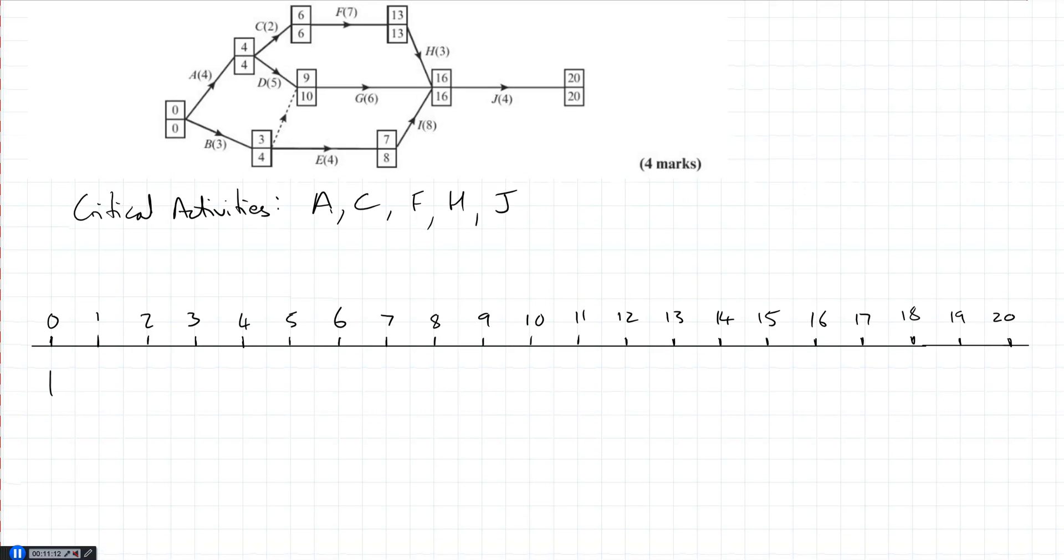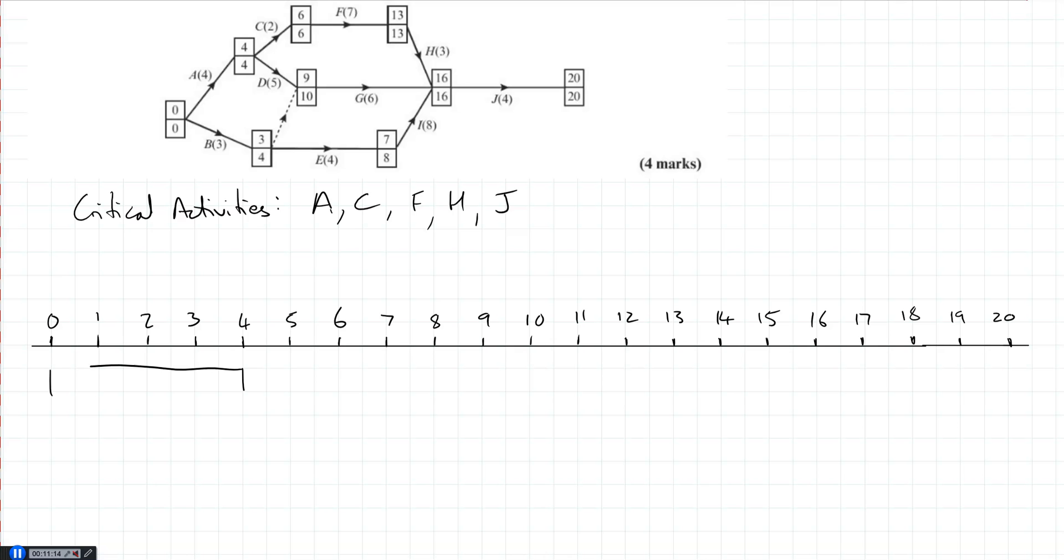So we're going to start at 0. A is 4. So we go up to 4. You know it should be nice and neat. C can start at 4. Goes up to 6. And last 2. F starts at 6. Goes up to 13. So it's all checking out so far. H starts at 13. It's 3. And J is 4. No gaps. It's a critical path. There should be no gaps whatsoever. It gets its own line. No other critical paths.